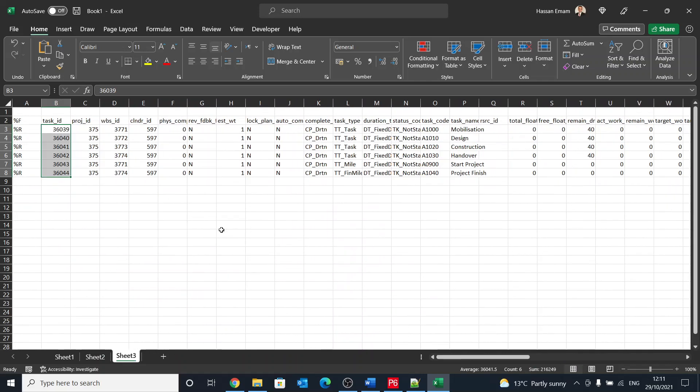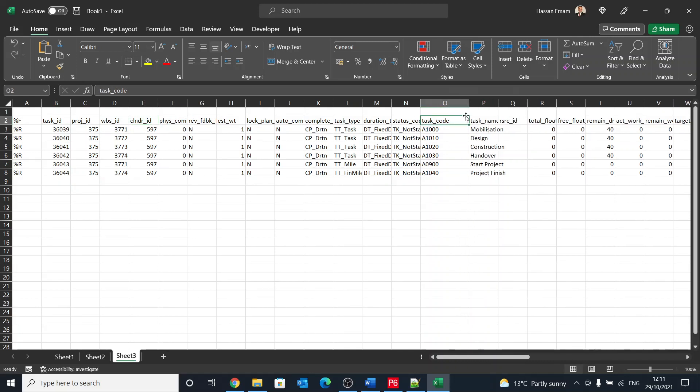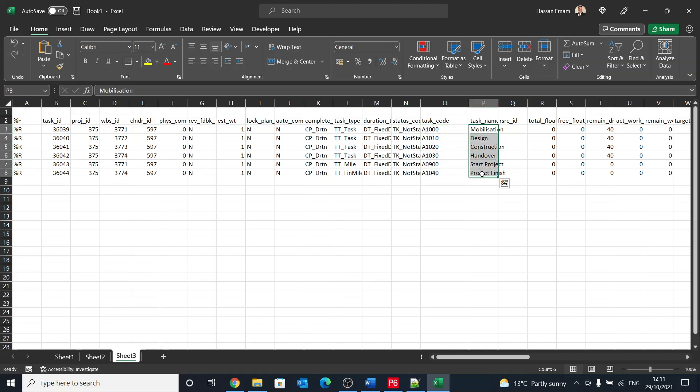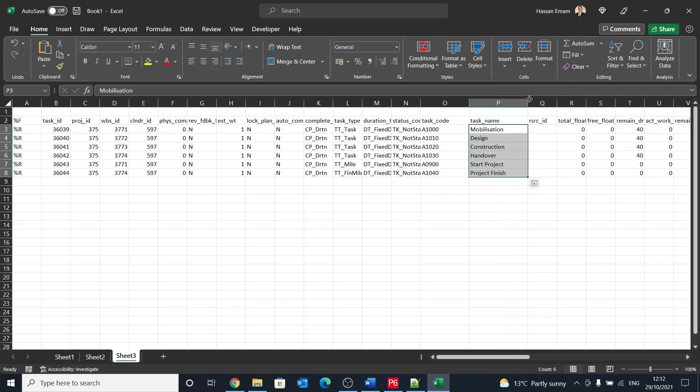We can search for it. Yeah, task code in here. So the task code are the activities or activity IDs that we have in the program, and the task name are the descriptions or the names of the activities as we mentioned them in the program. However, the link to the WBS is in that WBS ID.